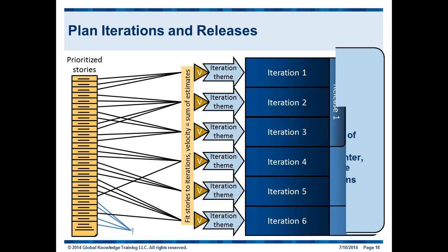Now we have our plan. We're going to pull stuff into the sprint. We're going to decide what user stories we want to work on, and we're always trying to pick from the user stories that are at the top of that prioritized list. We're actually going to get into the detail. Now this is where some teams have a conversation with their stakeholders, and they actually create detailed requirements, such as a use case. Now use cases are used by some Agile teams, but by no means all Agile teams.